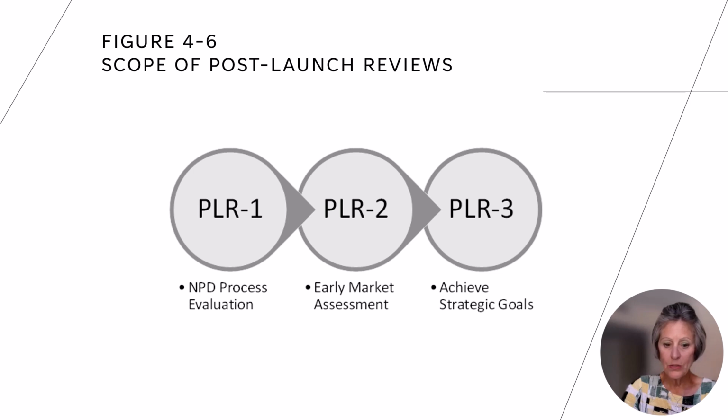Gate 2, design and development. Following initial exposure to the new product concept, the project will pass Gate 2 if the target market responds favorably to the idea. Funding for Stage 3 is approved at Gate 3 to further design and develop one to a few of the concepts with the intent of commercializing the best design.